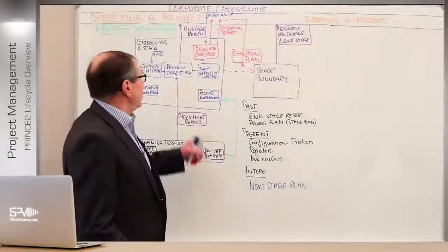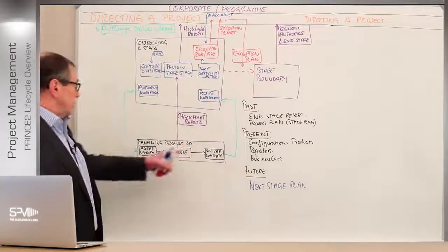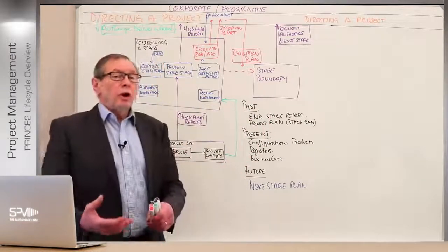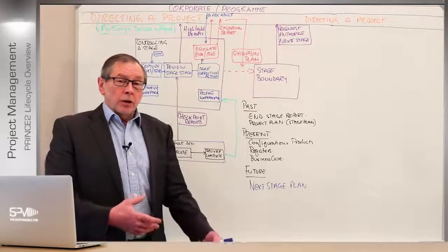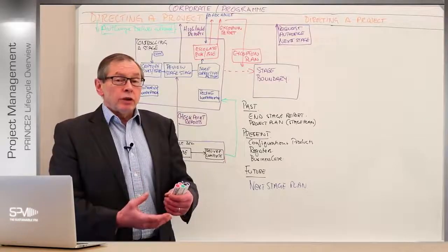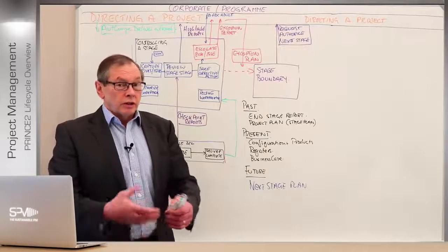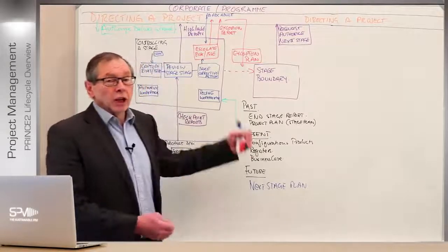Right, so now we've completed looking at controlling a stage and managing product delivery. Remember, very simple. Assign work to be done. Monitor the stage, handle risks as they come along and that you've planned for, and deal with any issues. Remember, we need to manage risks, respond to issues differently. Okay, have plans for risks, but we don't for issues. Escalate where we need to.